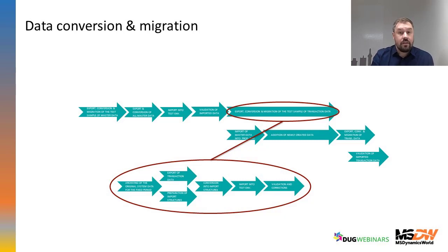So the final item cards are migrated, and of course, if they are changed or if they are created new in the last part of the project, in the last month, for example, you have to set up the process to get their addition of newly created data. You can tell people if you create it in the old system, you have also to create it in the new, or you can set up some change log, and then according to this change log you can migrate the rest of the data and so on. So this is how it works.